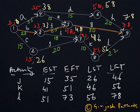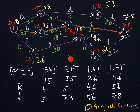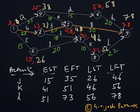Since the earliest start time of activity K cannot be disturbed, practically for J the latest time by which it must be finished is 41. So 41 minus 15 gives 26 days available. Since 20 days are required for doing this activity, 26 minus 20 gives the free float. For free float calculation we take the earliest time of the node where this activity is ending (41), subtract the earliest time of the node where the activity is starting, and then subtract the activity time. That gives the free float.